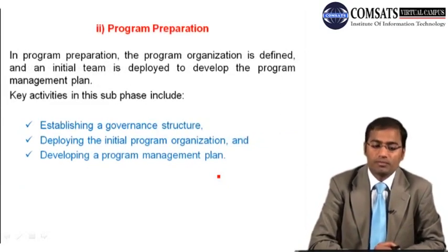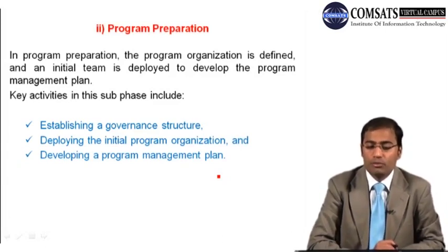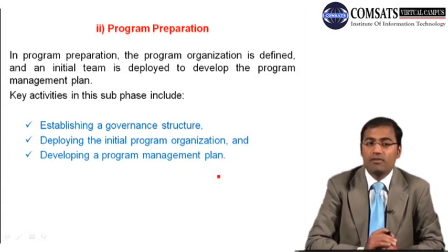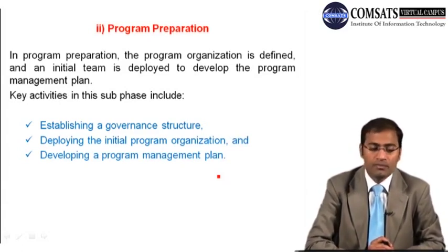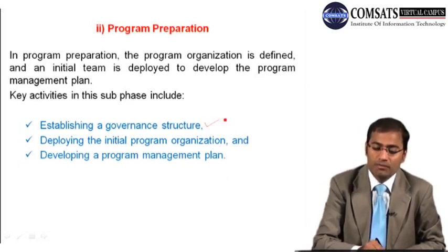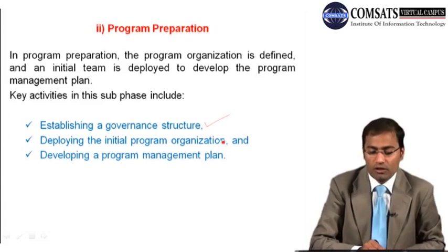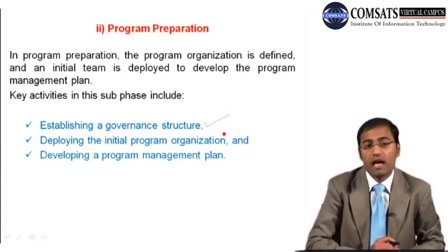And program preparation is the second subphase of program definition. In program preparation, the program organization is defined, like who is reporting to whom and how many people will be included in the team. The team is defined, and the initial team is then deployed to develop the program management plan. Key activities in this subphase include establishing a governance structure, deploying the initial program organization, and developing a program management plan. So this is the summary of what we have discussed.